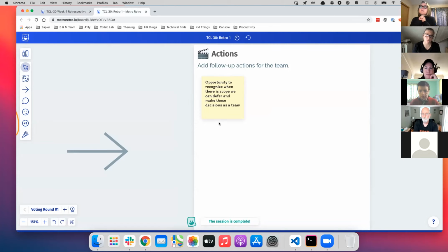I know that last week we knew that we wanted to get rid of that repeated loading state every time that the map moved, but we opted to defer it till later. We knew that was something we would address, but we also recognized that we wanted to get some work done. So we did that bias for done that week and then deferred the loading state. So I think that was a good example of following that action item.